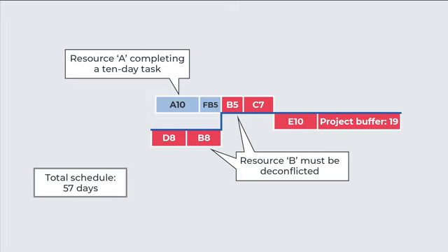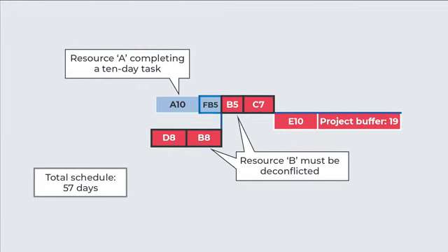And as you can see, it is possible to create a buffer here which generates a new critical chain, which is shown by this sequence. So first, these 2 activities, then these 2, and the buffer is just 5 days, which is half of the duration of this activity here. In this way, the process is completed in 57 days. This example shows the process of application of the critical chain approach.